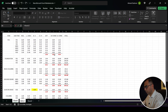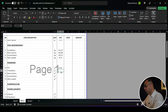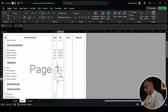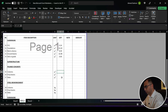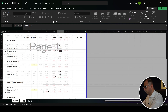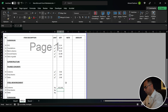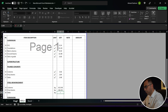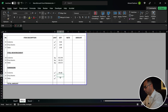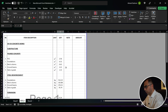For the formwork I need both the horizontal and vertical components. For the PCC it's this plus this; for foundations this plus this; neck columns this plus this; ground beams this plus this; slab on grade this plus this — which is actually zero, so I can remove that item. For the superstructure: columns volume, drop beams volume, slabs volume. Then steel reinforcement for columns, drop beams, and slabs. For formwork: columns this plus this, drop beams this plus this, slabs this plus this. Now I have all my quantities.